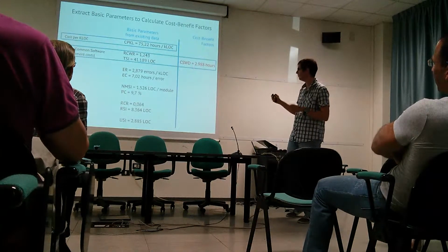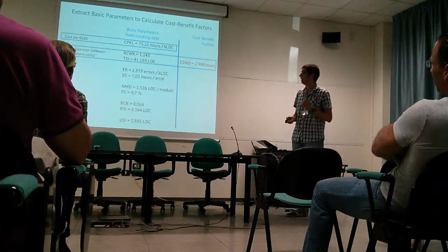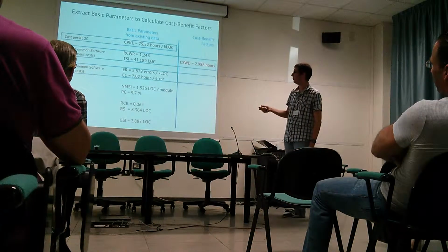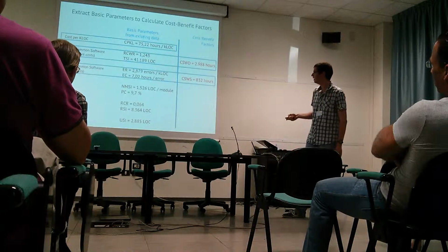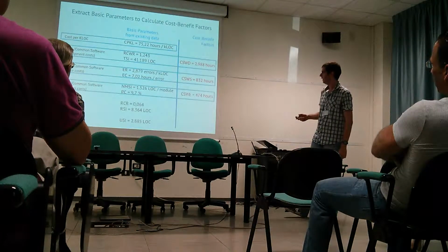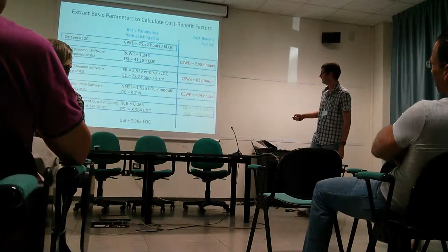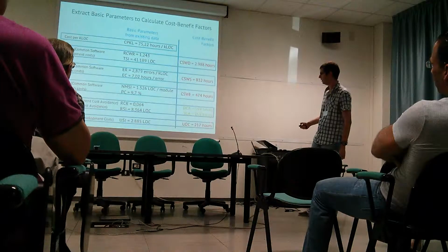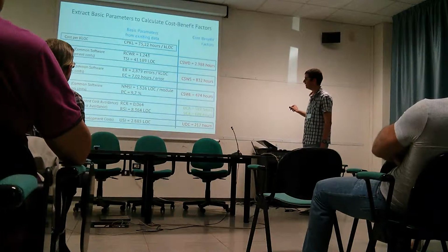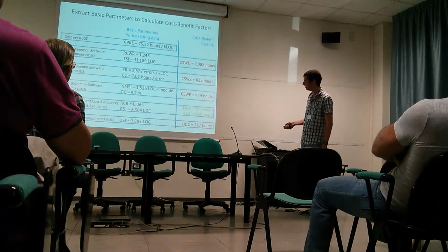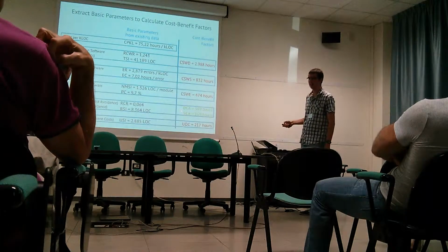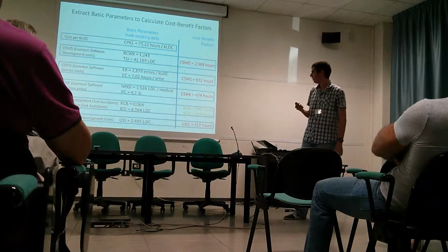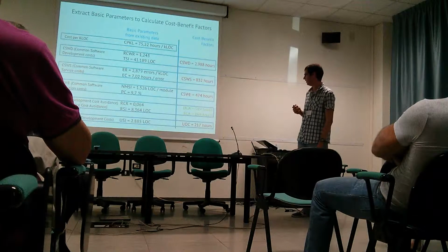And this is the upfront investment in the software reference architecture. In this way, we also calculate the maintenance costs and evolution costs. These 3 are for the architecture, and these 3 for each application. So we see that the investment is really high, but also if a lot of applications are based on the reference architecture, we can get a positive ROI.